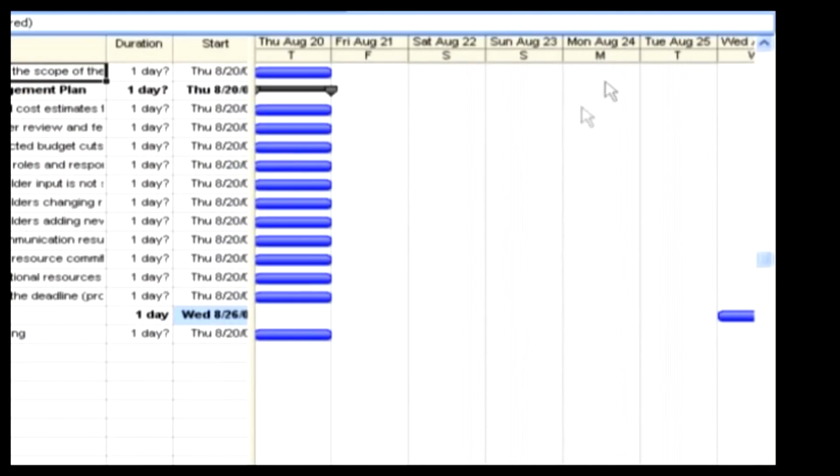Click OK now. Now, see, 2 exception days have been added. See the Gantt chart here. We can see the grayed option for 2 days. This gray-colored box shows the exception day. See, the rest are white in color, which are clear working days.